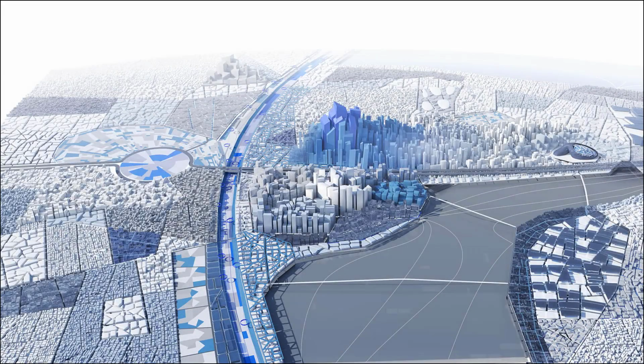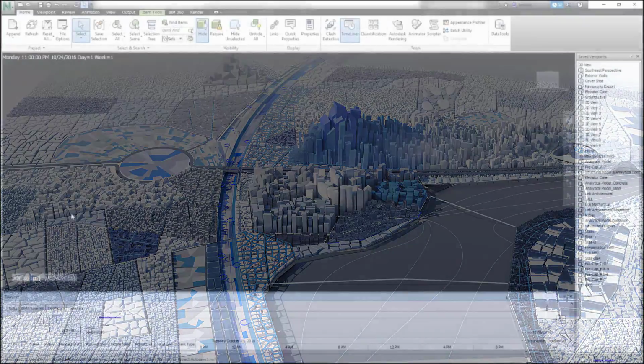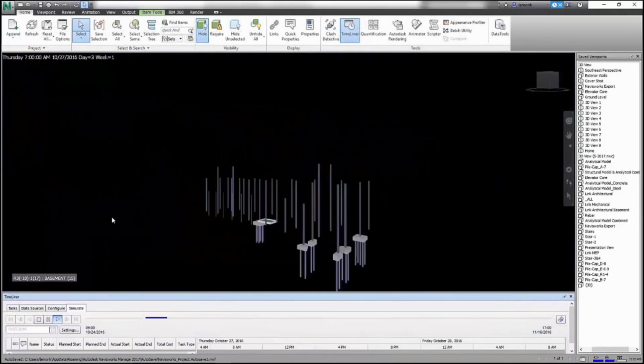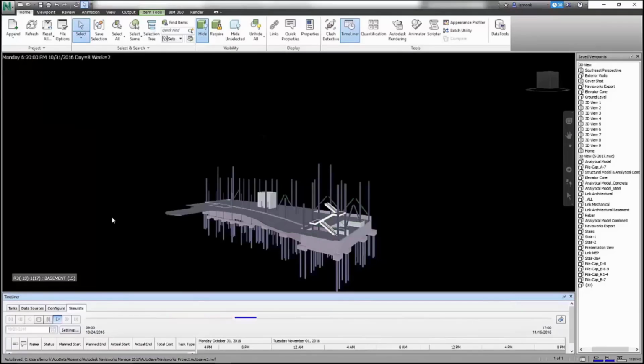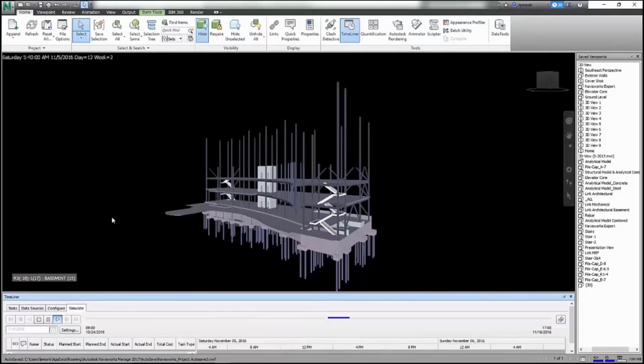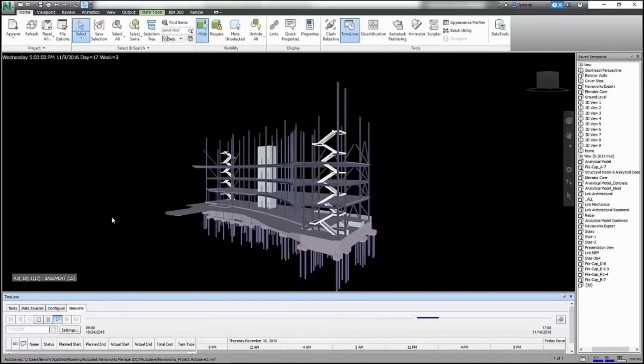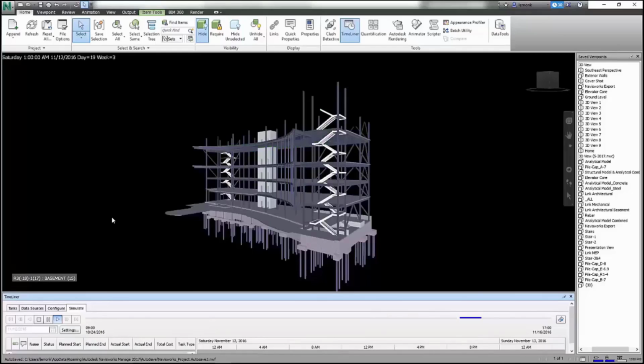Navisworks Timeliner creates 4D simulations, a simulation that includes time of the construction of 3D models, by attaching items in the model to tasks with a start and end date. You can create a simulation that shows sections of the model being added or removed over time, according to the